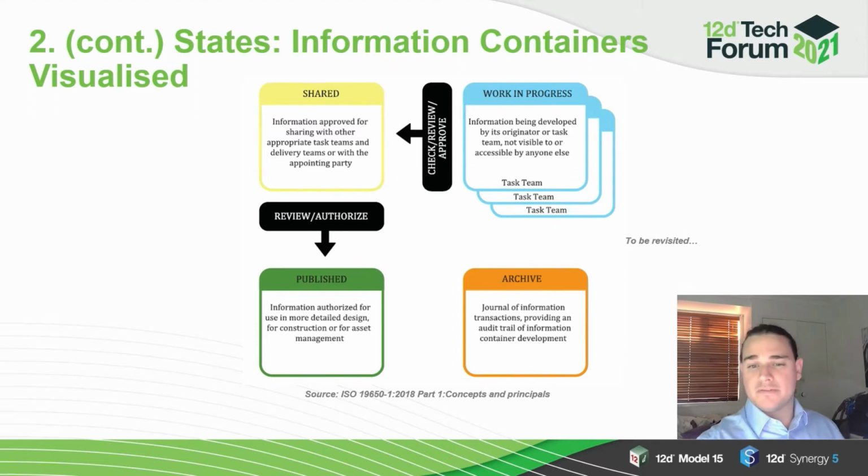Once we have that information developed to a certain point, thinking back to our workflow demonstration from project commence to project complete, we then want to invite comment. We want to consider the wider context of what information we're creating or what design we're developing. And so we change the state of that information to a shared state, and we move that information to a shared container.